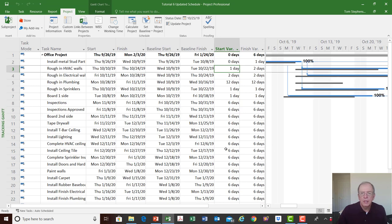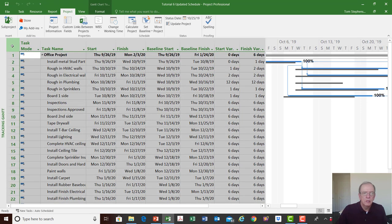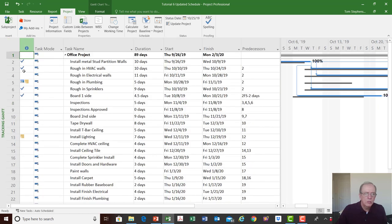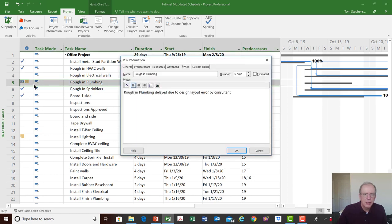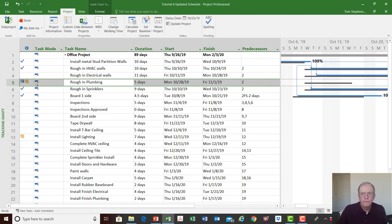That tells me something made us start one day late and our duration was one day longer than expected. Once we know that, we can document why we started one day late and why we finished two days late. It's always good to put notes in your activities when updating. I double-clicked the activity, went to notes, and typed 'rough in plumbing delayed due to design layout error by consultant.'